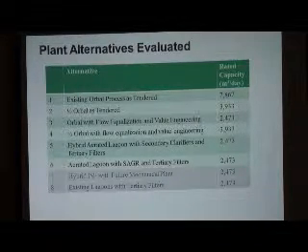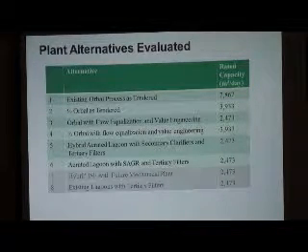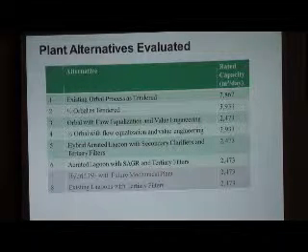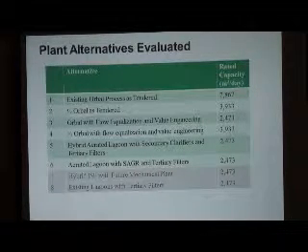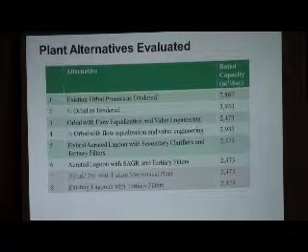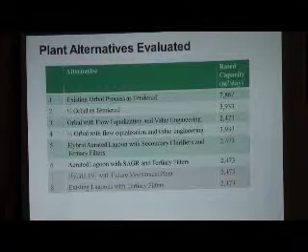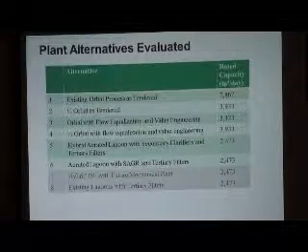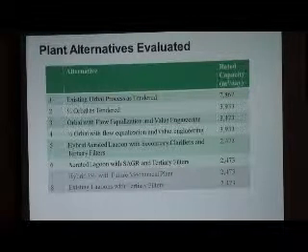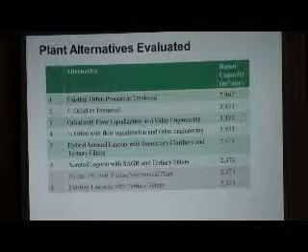We also had the half orbital as tender, which was the phase 1 of the tender price. Option 1 is phase 1 and 2. And then we had the orbital, but we used equalization. We also used what I call value engineering, where we took a look at the plant as designed and said, okay, what's in here that we could eliminate without changing the basic function of the plant.